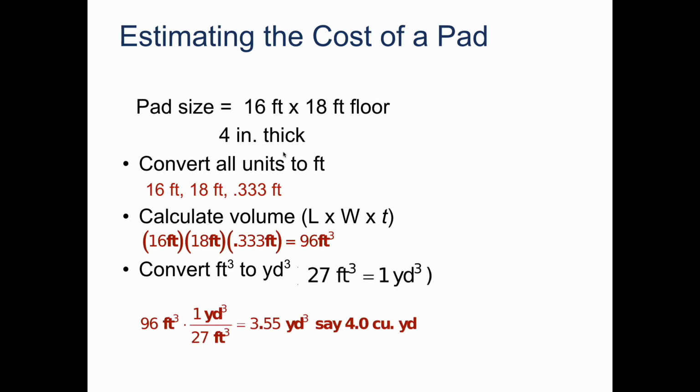Cubic yard is a whole lot greater. So in terms of this, because it's sold in cubic yards, we need to make sure that we're using dimensional analysis to ensure that everything ends up getting converted from cubic feet to cubic yards in the end. And the process you go about this could be a whole lot different.